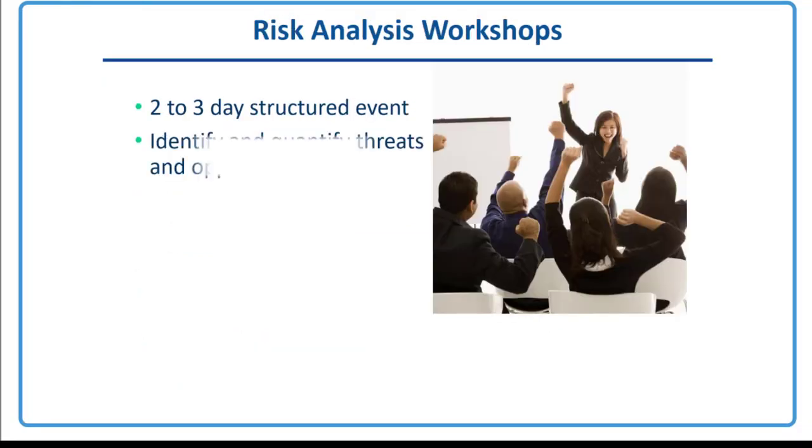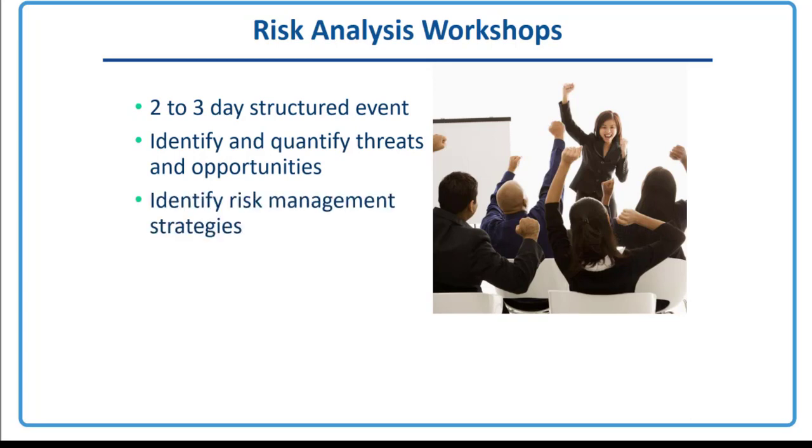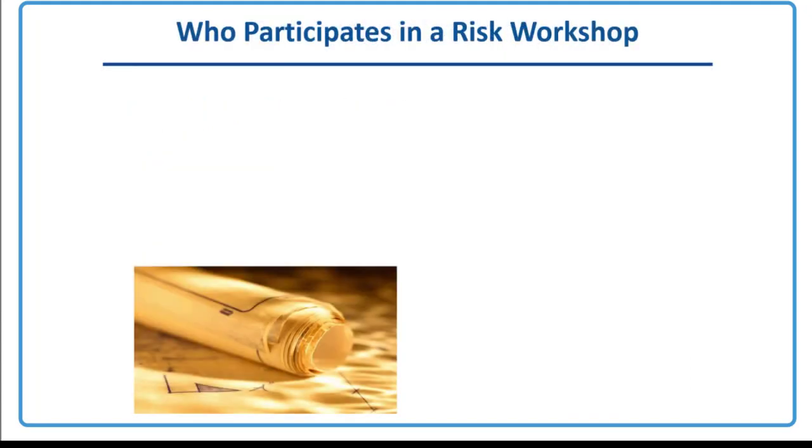So our risk workshops consist of a 2 to 3 day structured event. During this workshop, we identify and quantify risks, threats, and opportunities on the project. We'll also identify various strategies that can be used to manage those risks. And it's all one big collaborative effort with the project team and the subject matter experts.